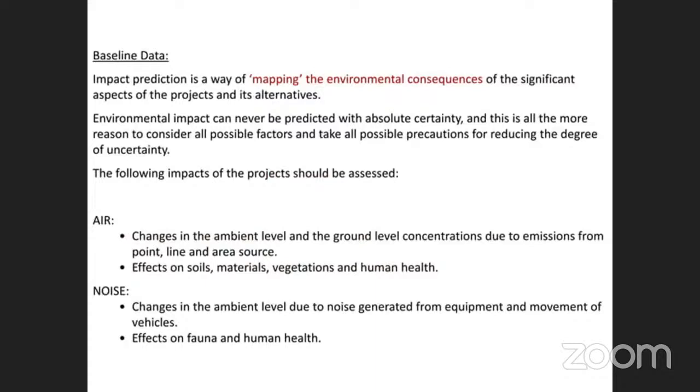The noise monitoring should be done during daytime 7 a.m. to 10 p.m. and nighttime 10 p.m. to 12 a.m. The exercise of monitoring noise pollution is required in baseline data of noise levels, and traffic volume data is also needed for recording,